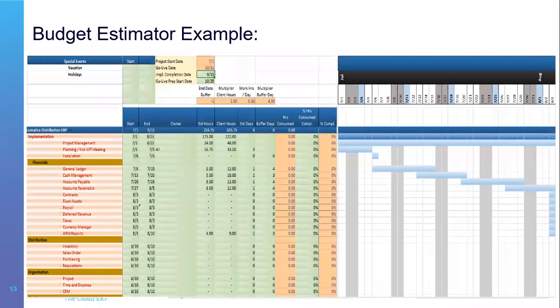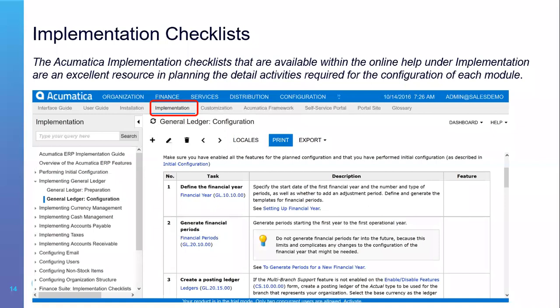For example, if I'm putting 2 people full time for a week to a customer, it's 10 man days that I'm using, but it's only 5 days duration, right? It can be the other way around. Public holidays, take this into account when you develop your schedule. Ask the customer if they have times where they're not available. For example, you don't get the finance team normally at month-end closing time. So ask them from the beginning and try to schedule your project around these times where they are off and won't be able to join.